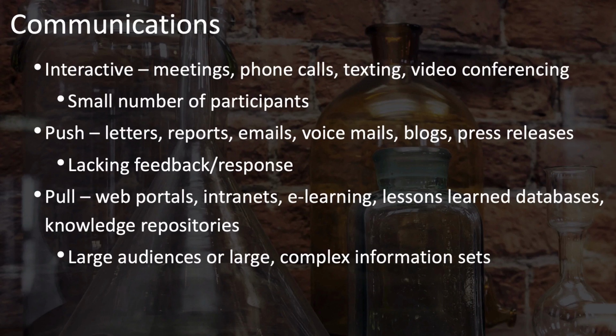Pull communications are things in which the information is there, and if you want to learn it, the recipient of the information needs to go to that source and pull the information to them. It isn't sent to them, they have to go after it. These are things like web pages and web portals, intranets, e-learning sites, even your lessons learned databases and repositories, and your knowledge bases. This is very useful for large audiences or large, complex sets of information. However, of course, it has the disadvantage that people may not be aware that the information is there for them to get, or that there are updates to that information that they should be seeing.